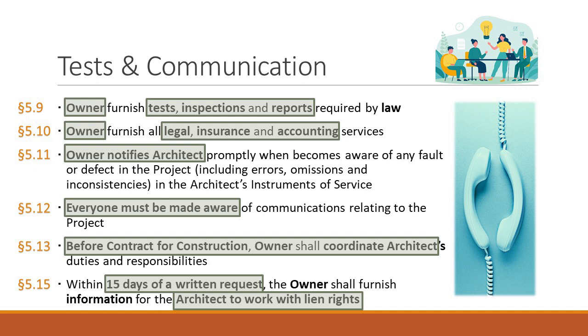So the owner does not need to take on the obligations of the architect, does not need to have the professional standard of care. It doesn't need to act like that. That's not a contractual obligation of this provision. But if it becomes aware somehow, by their own knowledge or other people informing them, that's when the owner has to speak up. So this is important in that sense.